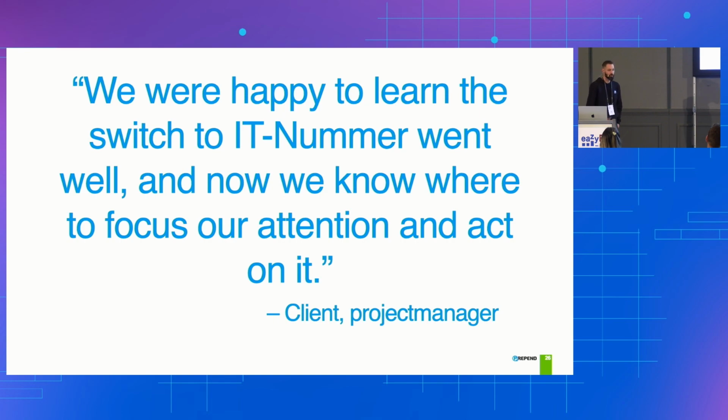The customer learned a couple of things during this process. They learned that there were a bunch of issues that were not allocated to a budget because they were used by external partners who didn't get the memo that they should use the field. There were some projects that were already closed that, when they still used the old field, did have a number for it, but when they generated the new field, they didn't have a number for it, and a bunch of organizational stuff.